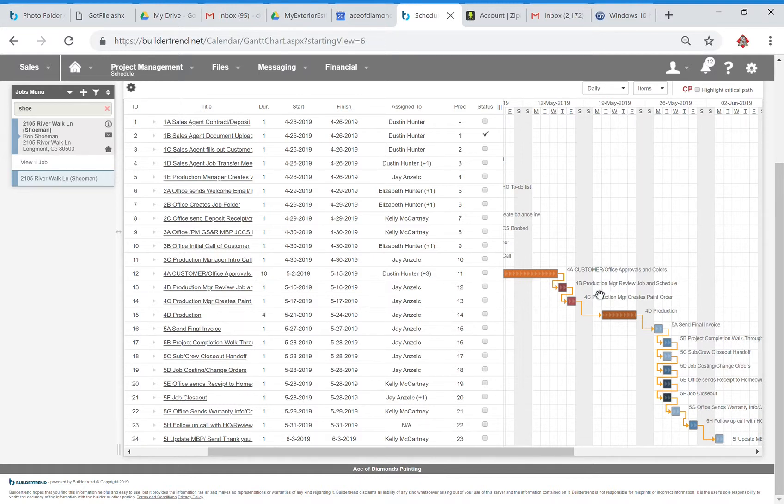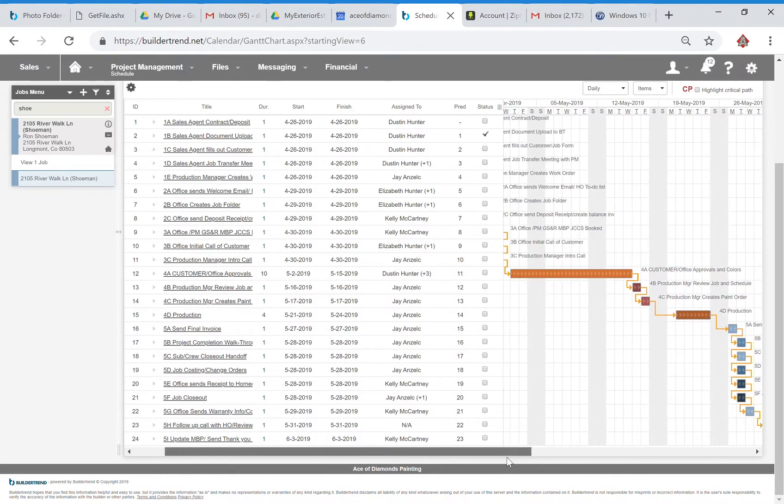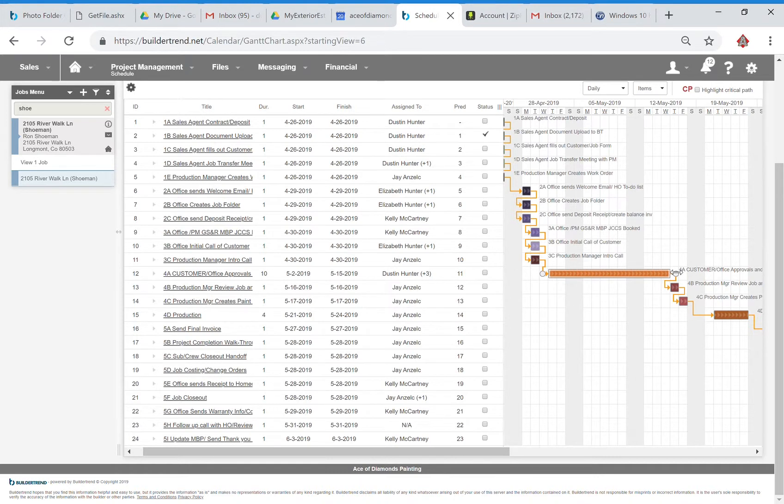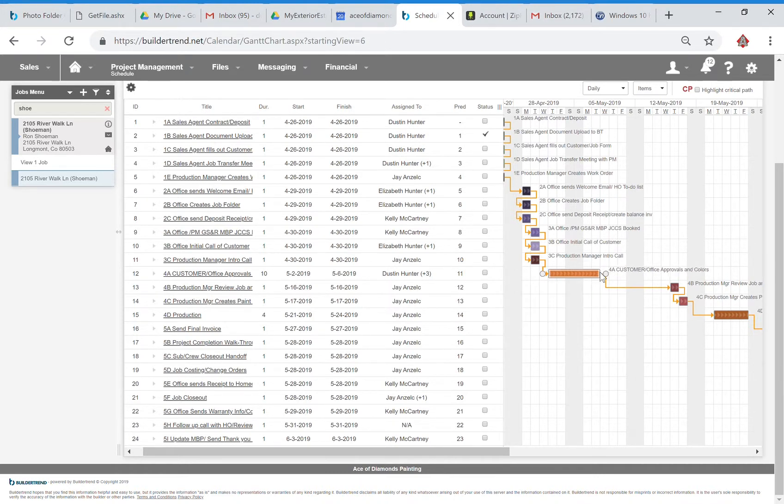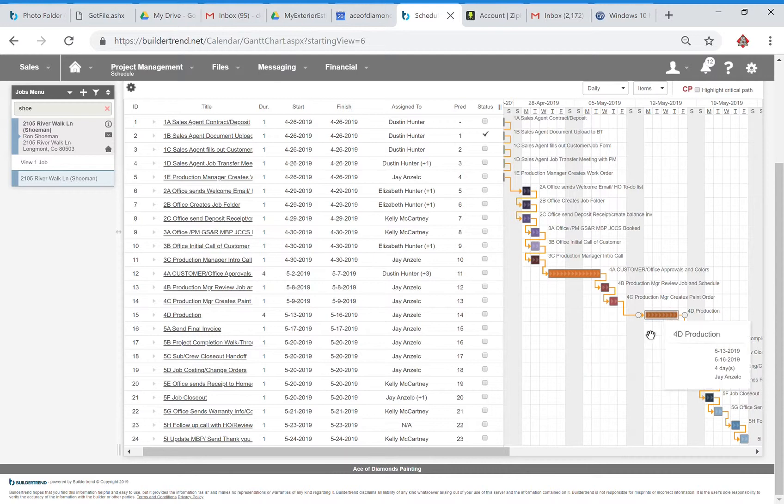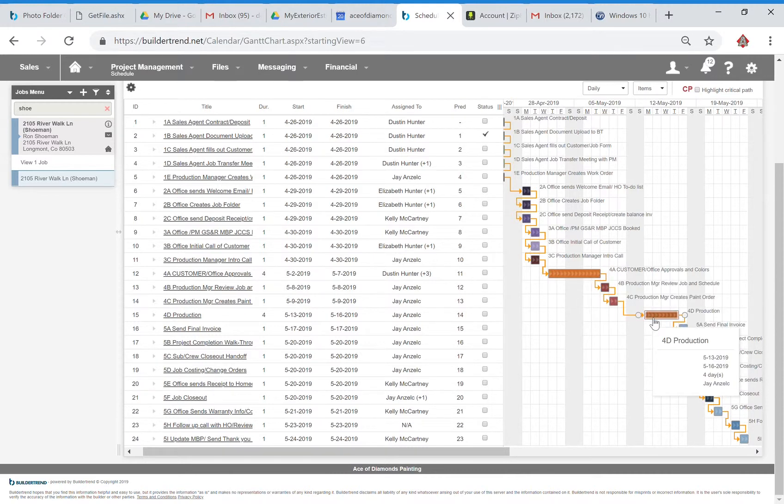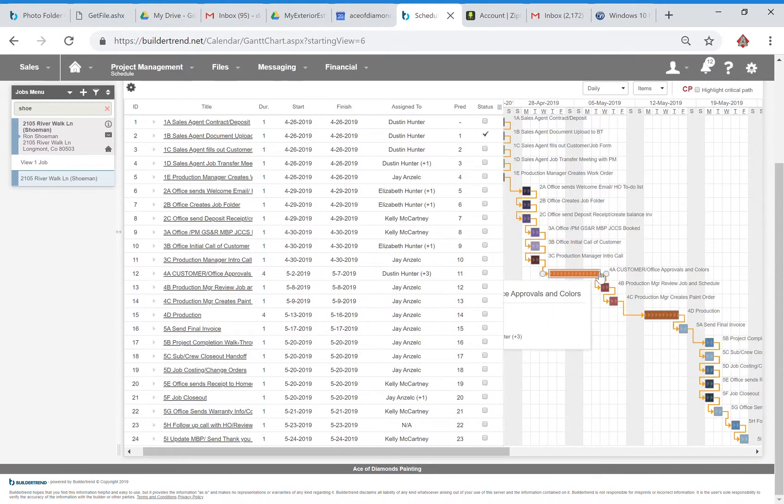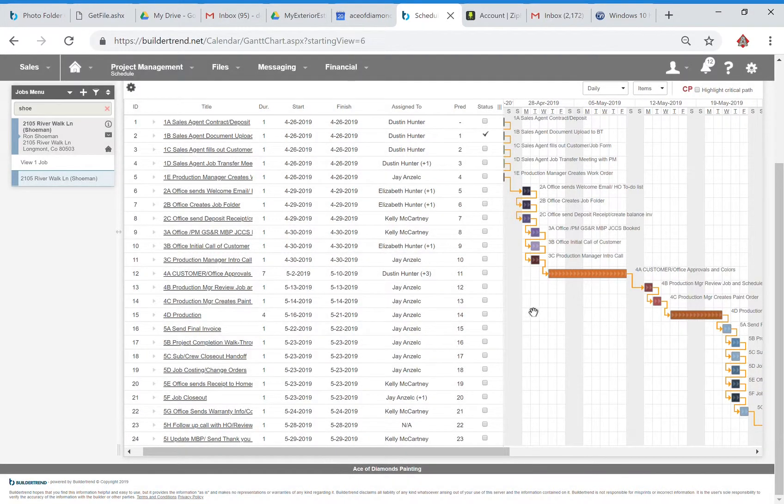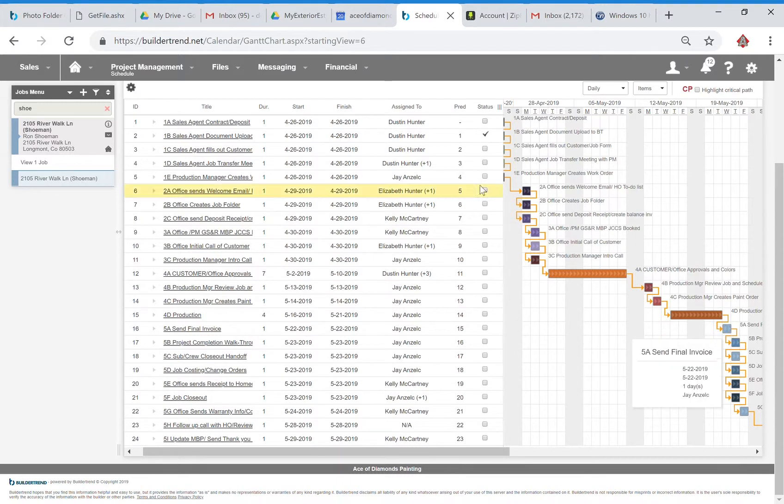If we wanted it to start sooner, what we would actually need to do is make the lag time on this come smaller and then watch when I do that, everything kind of moves on this end to the actual start date. And so this is kind of where you want to be able to drag that to kind of adjust your markers of when that's actually going to start.